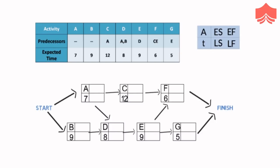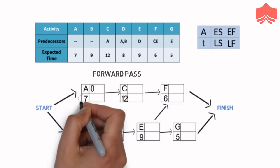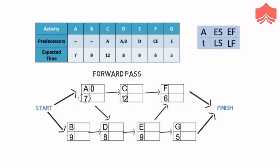The numbers below the activity name represent the time required by the respective activities. Let us do the forward pass. A is the first activity, so it can start right away. Therefore its earliest start time will be 0. It will take 7 days to be completed, so its earliest finish time will be 0 plus 7 equals 7 days. Similarly, B will have the earliest start time of 0 and earliest finish time of 9. C needs A to finish first, and we have already seen that A has the earliest finish time of 7. Therefore, earliest start time for C will be 7.